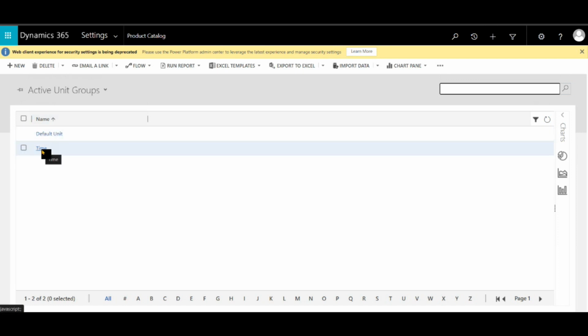So basically in project operations, what happens is you either sell your time or your product, right? So that means when you are contracted for a project by your customer, how will they pay you the money? It's based on the effort you spend, right? Effort means the time. So we have to bill them: we spent some X hours of time on your project. So for this, this is the hourly rate and this is the cost you have to pay us.